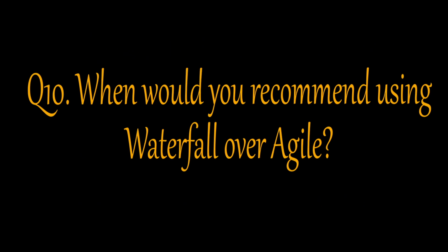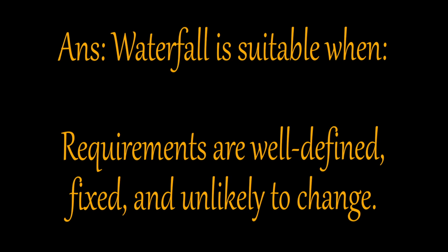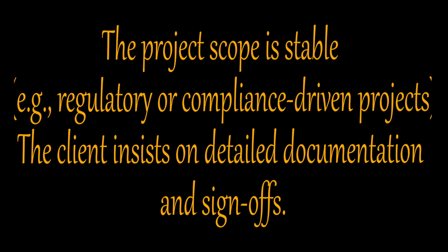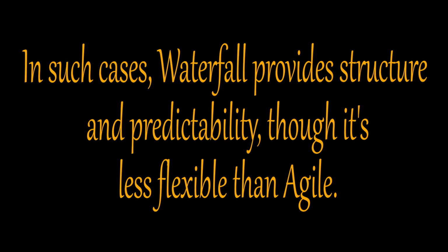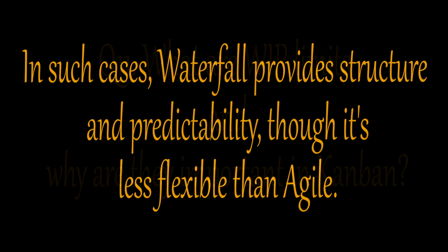Q10. When would you recommend using Waterfall over Agile? Answer. Waterfall is suitable when requirements are well defined, fixed, and unlikely to change. The project scope is stable, e.g., regulatory or compliance-driven projects. The client insists on detailed documentation and sign-offs. In such cases, Waterfall provides structure and predictability, though it's less flexible than Agile.